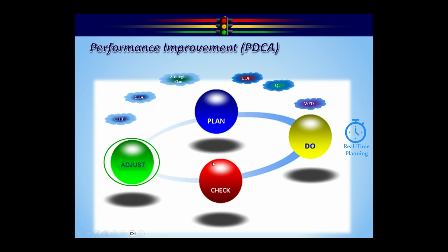Now let's say for a second that the top of that chart I just showed you, which by the way is what we call the micro level performance monitoring, was at 21% and not 25%. Now we've got to make a decision. The decision comes down to one of two things. Is the plan just too high and we can't get there? If that's the case, we adjust the plan maybe down to 21% and continue through the cycle. Or if we threw more resources at it, could we get to the plan? So maybe in this case, we need to do more training sessions.